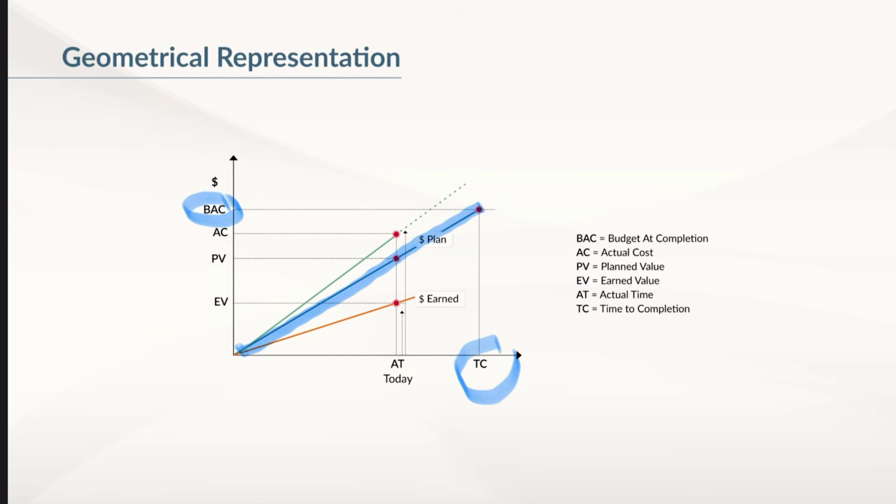Let's now say that today you are at the 80 point of time. Given the tasks in progress or tasks completed, you can compute the earned value using one of the previous methods. You add this point on the graph. In the slide, the trace over time of EV is shown in the red line.